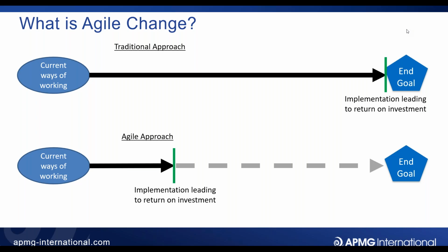And there's going to have to be a lot of trust between us, because I'm absolutely going to purchase all the things I need for this first increment or iteration, to create the first outcome, and then I'm going to come back to you for the second outcome. But you're absolutely right, I'm going to do this as a call-off contract because I'm not paying for everything up front. So there has to be a huge amount of trust.